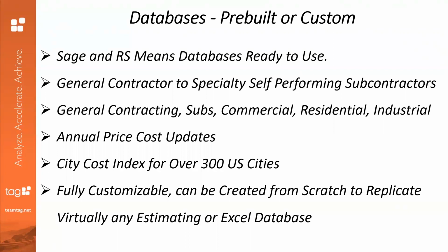A valuable tool. And this also points to the fact that you can have flexible rates. Let's just say you have prevailing wage rates that are specific to a project. You can plug those in and have a very specific rate class just for this particular estimate, and it tracks it. It also keeps track of what the original rates were before you made any modifications. It's fully customizable and can be created from scratch or replicate virtually any estimating or Excel database that you may already have.